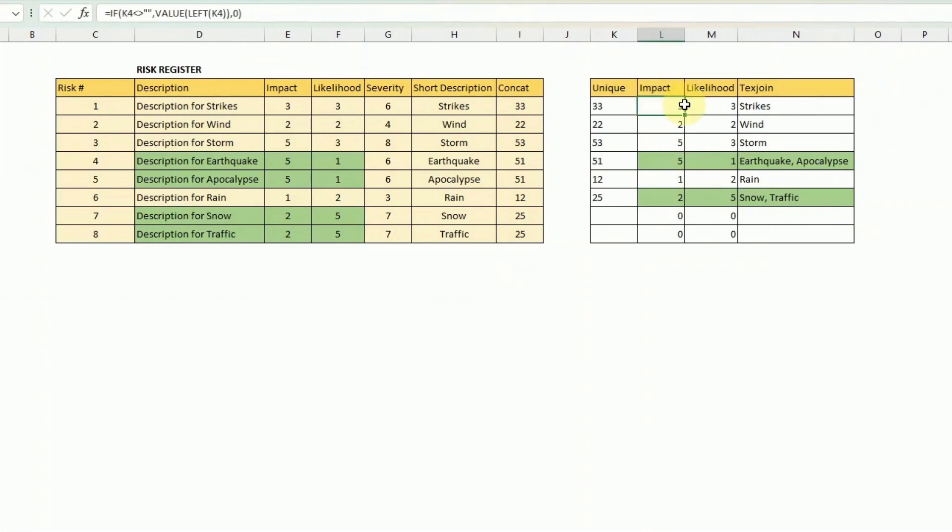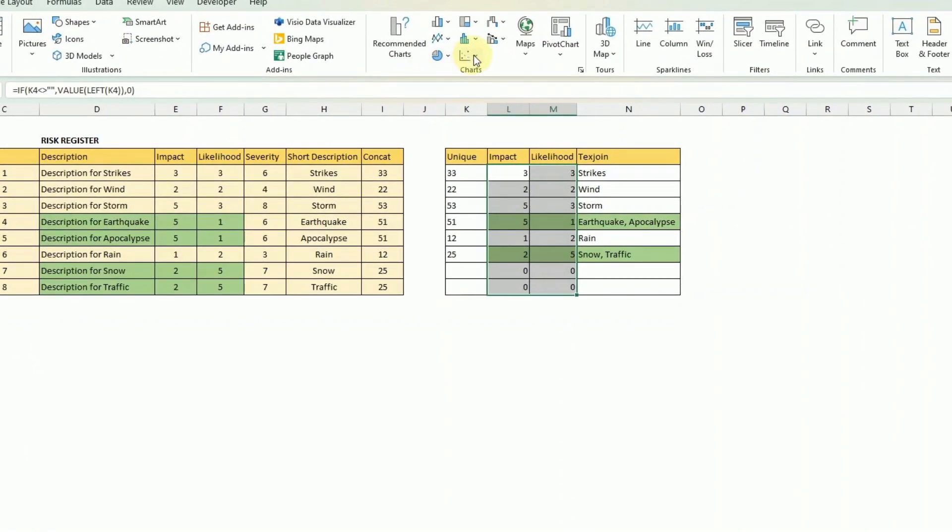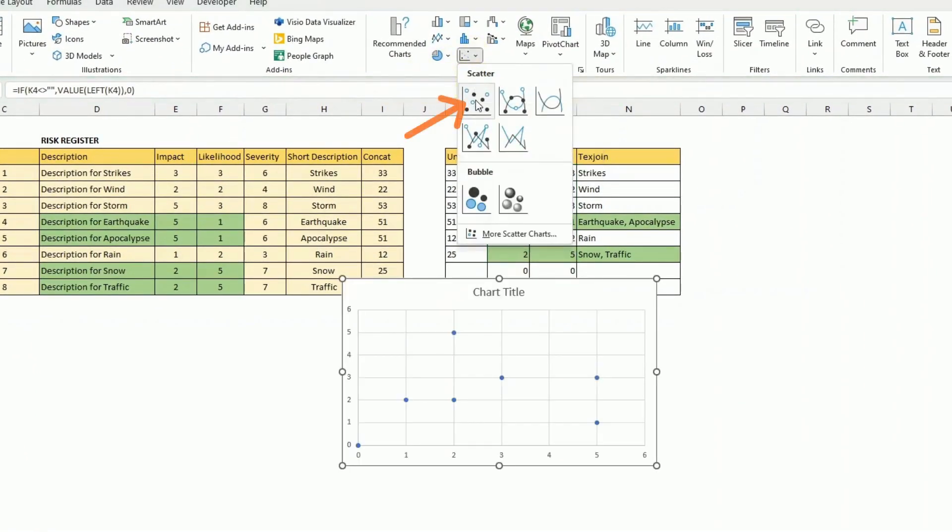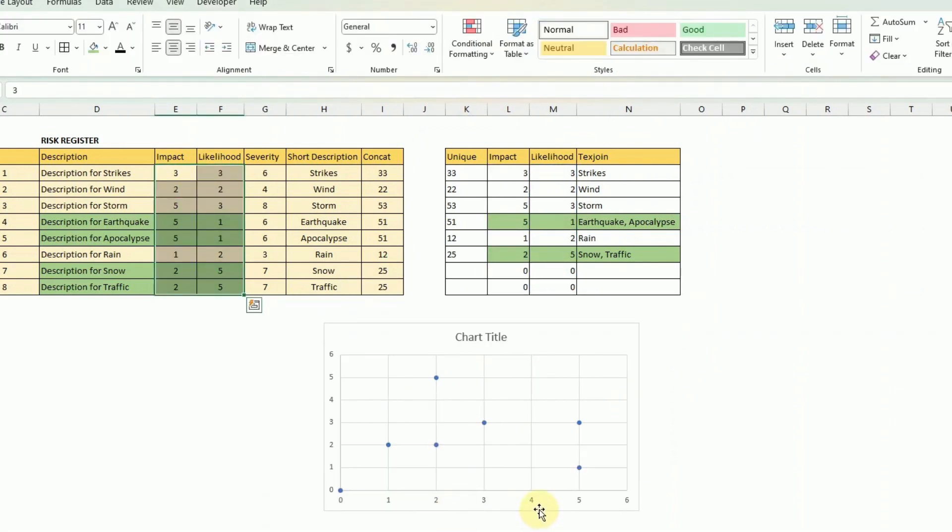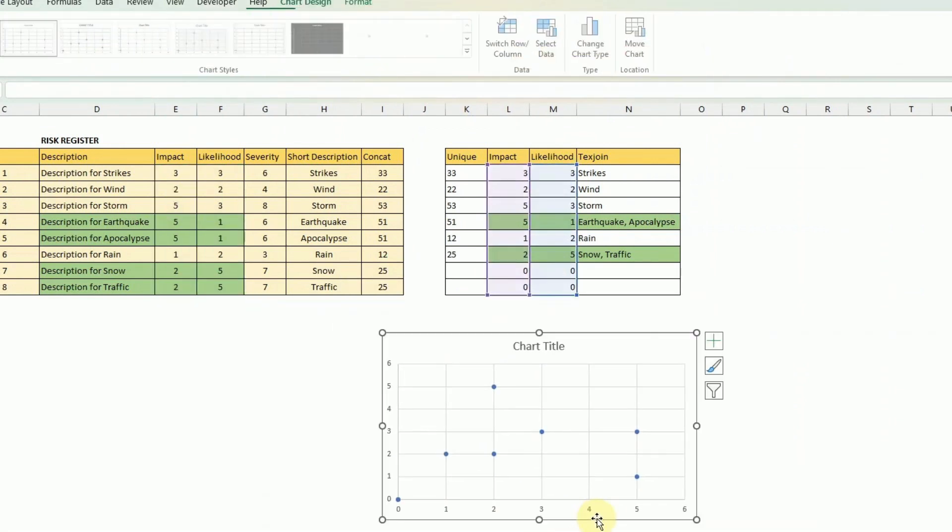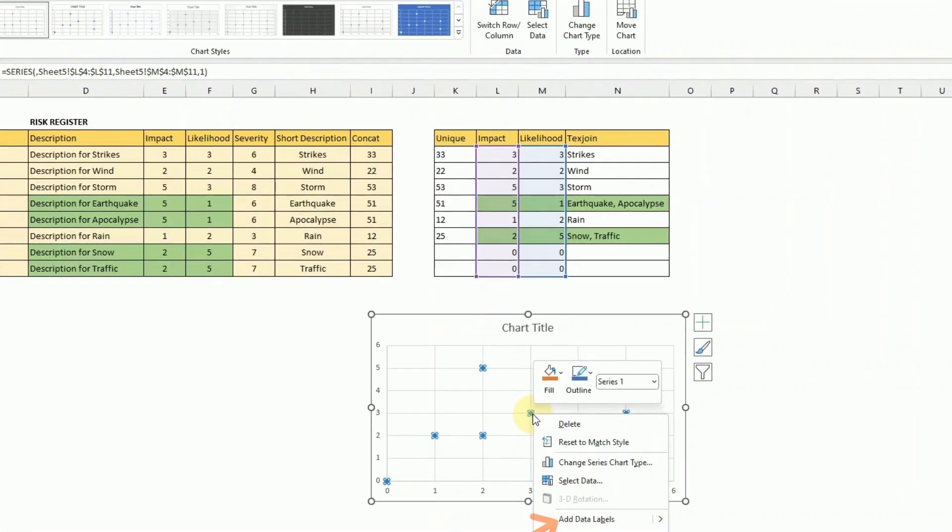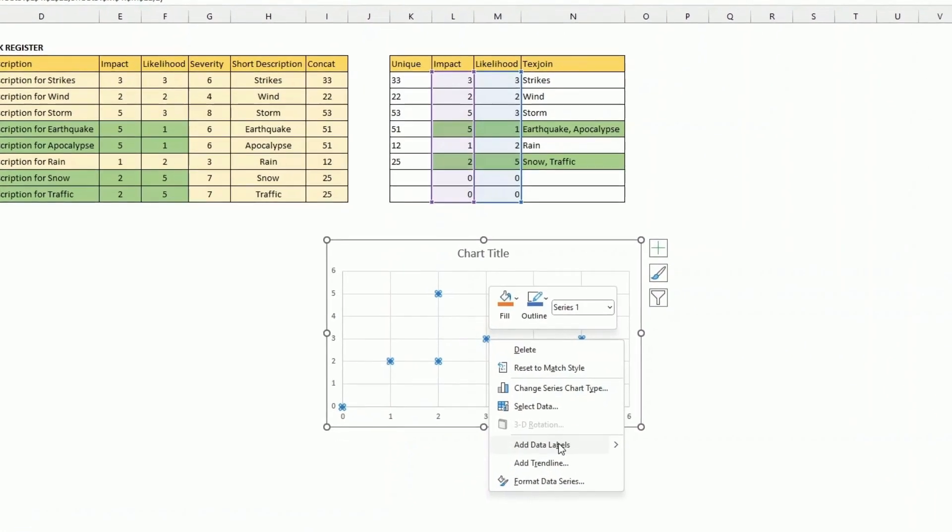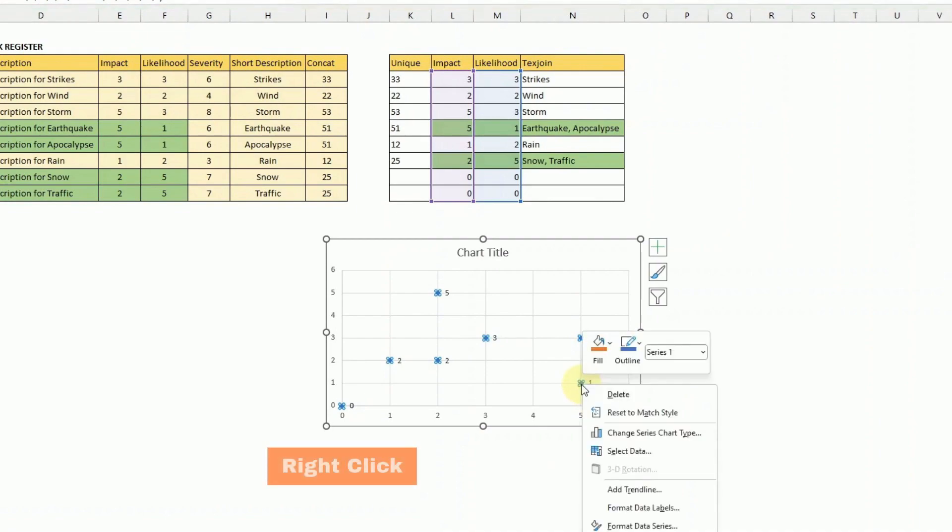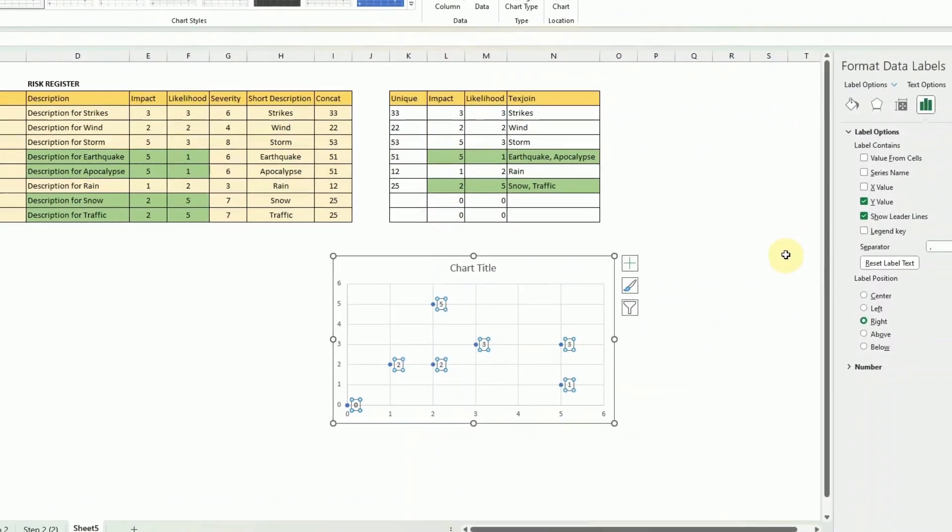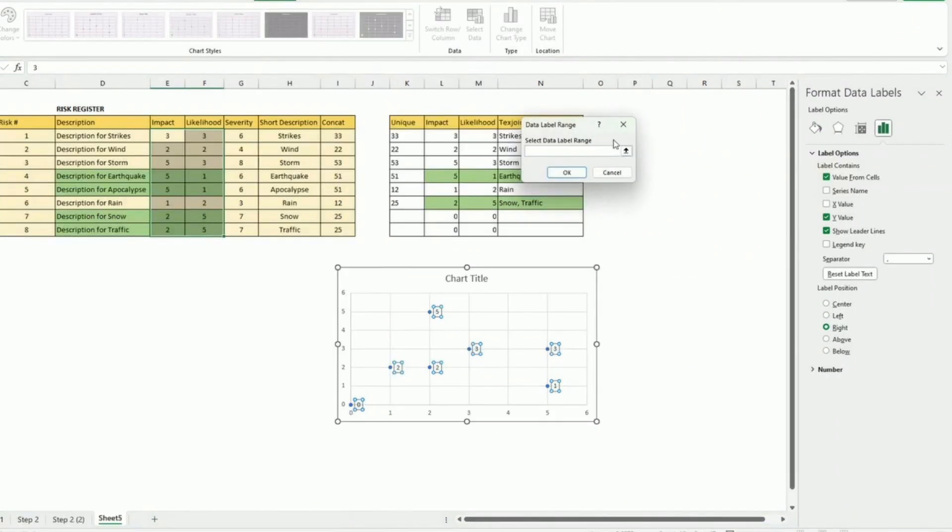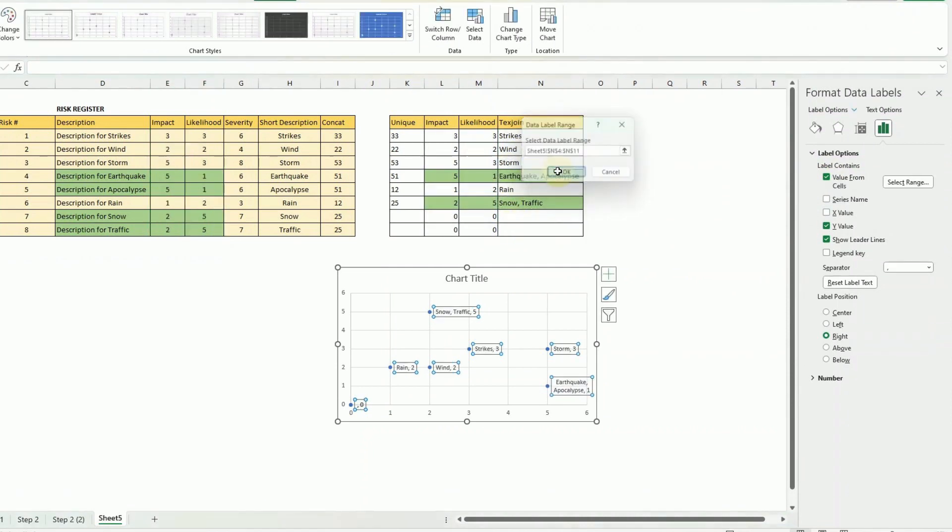So next I just select the impact and likelihood fields of the consolidated table and I insert a scatter type of chart. With the consolidated table what we can do now is we can add the data labels. Format data labels and instead of the value I'm just going to put value from cells and I select the text join column. Now I can remove the values.